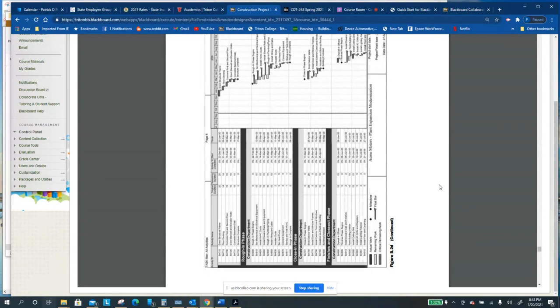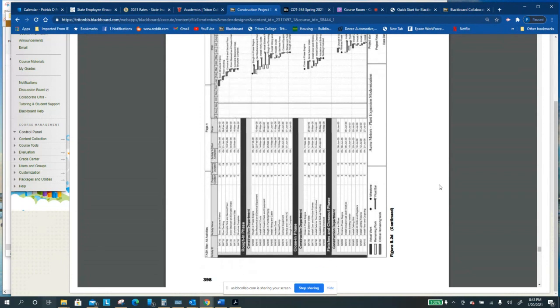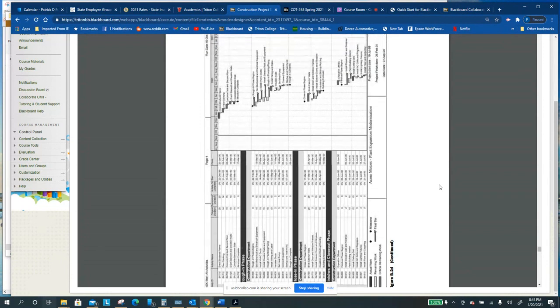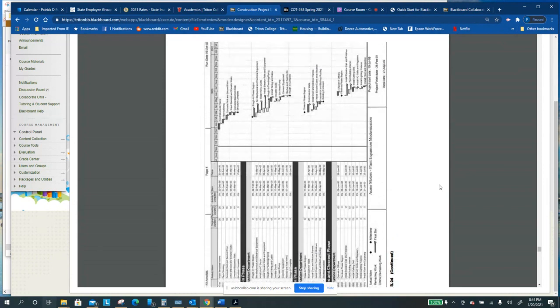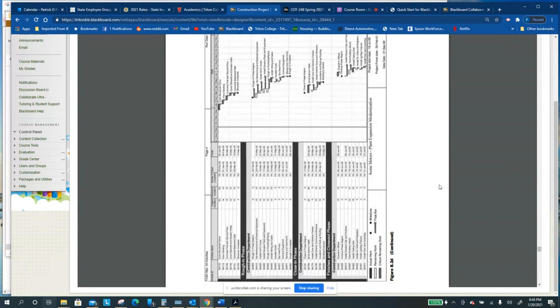We do that as much as we can, but you're going to affect price. You're going to greatly affect the bottom line of the project, which is often measured in dollars, and that's going to show up. If you have to spend more to get something done faster, I hope someone considered that early on, because you're always going to run into situations where you have a limitation.